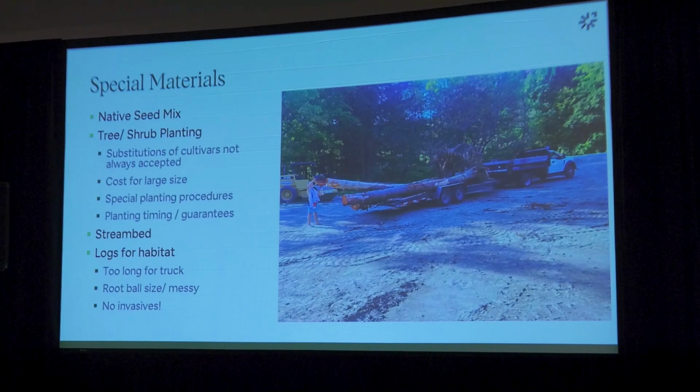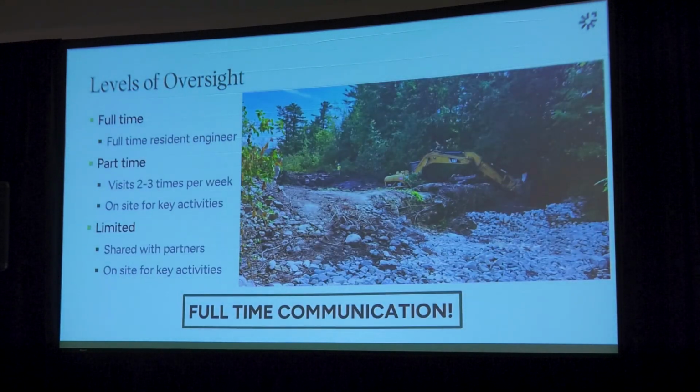And for us, making sure there's no invasives on some of these materials that are coming onto the site. So we sometimes wind up actually going to a location where something is and reviewing those materials before they make it onto the site, to really make sure they're going to fit the project. So, different levels of oversight.